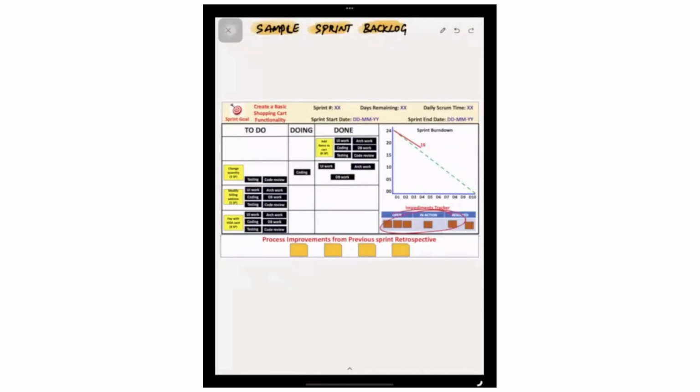And these are the impediments, what impediments are resolved, what impediments are in progress. And I would recommend to divide this impediment board into 2 sections. So these are the team level impediments where the developers are responsible because they should be self-managing. And wherever they have power, ability, knowledge, skills to resolve the impediments, they can resolve on their own. These are global, organizational, systemic impediments. Hopefully, Scrum Master will help to get the required support to resolve the impediments for the developers. So it will be easy for tracking the impediments, team level impediments, and global, organizational, systemic impediments using this board.